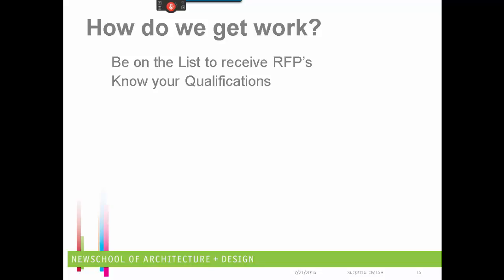The second step is you need to ask questions for clarifications. This is really crucial. If you don't ask requests for clarifications through an RFI process, then you will not get answers. And if you make assumptions, it's highly probable that you will not make the correct ones. So the RFI process is really crucial. Oh yeah, you're going to ask, what is an RFI?